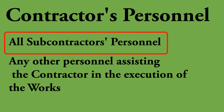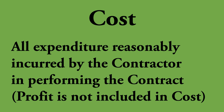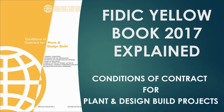Then I'll talk about 'cost'. Cost means all expenditure including taxes, overheads, and similar charges, excluding profit, reasonably incurred by the contractor in performing the contract. So any expenditure before entering the contract cannot be taken as a cost.